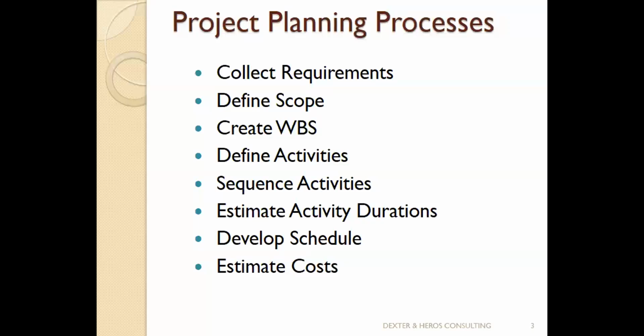So once I have the list of the works, which is what we called define scope, one thing that will play in my mind is, are you sure everything is complete in terms of the works to be done? To answer that question, I will now arrange the works according to the phases where they will be carried out, so that I can just look at it phase by phase. So when I break my project works down into phases, we'll now say you're creating a work breakdown structure.